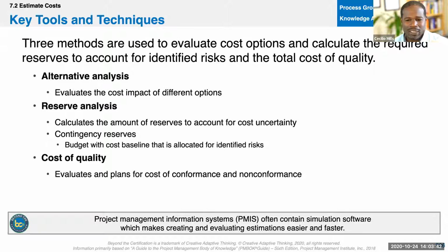And then reserve analysis, again, we reserve money or we reserve time. So if a team member comes to you and you're asking them for their cost estimates and they say, yeah, it's usually like 130, but we tend to make a couple mistakes, let's call it 150. They're padding or buffering their estimate, right?